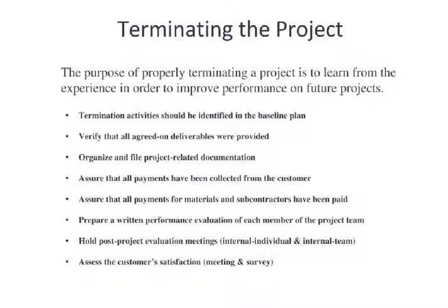Remember, the baseline plan is primarily focused on your network diagram that shows the interrelation of activities, the duration of activities, the timing of activities, and the responsibility of activities. All of the activities necessary to terminate should be a part of that network diagram. So from the very beginning, you should be planning this. This is not something you just tack on to the end of the project. It should be a part of the plan.